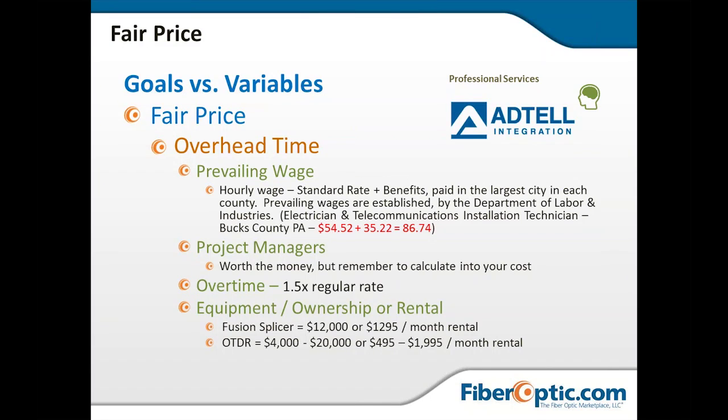Overtime. You need to make sure that you're calculating overtime. If they're working over 40 hours a week or 8 hours a day, you've got to calculate that 1.5 times regular rate into the equation. Otherwise, again, you're going to wind up getting yourself into a jam.